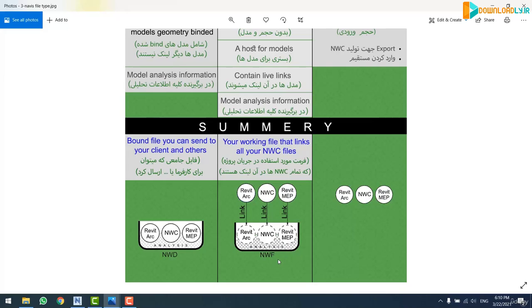Certainly the analysis process. Do you remember the folder? The NWF size includes the text or notes which have been written down on the first page of the folder. Suppose that in the clash detection process you have detected 2 objects, or for example you have defined a time schedule. All of these are going to be saved in the NWF file, and these are going to compose the size of the NWF file.